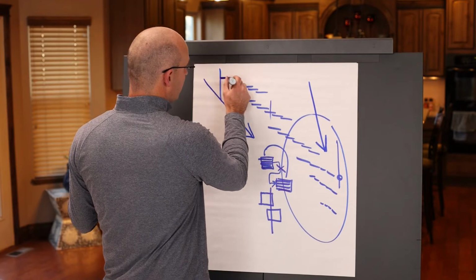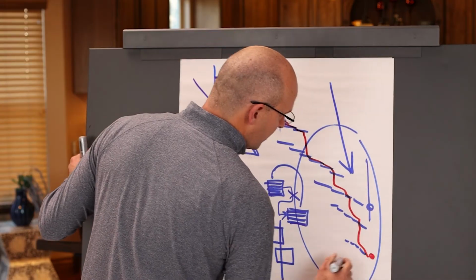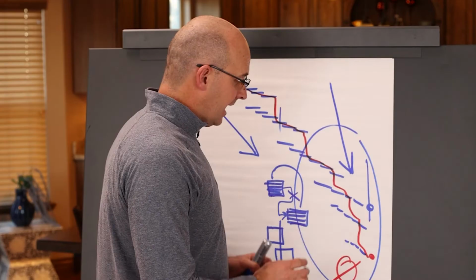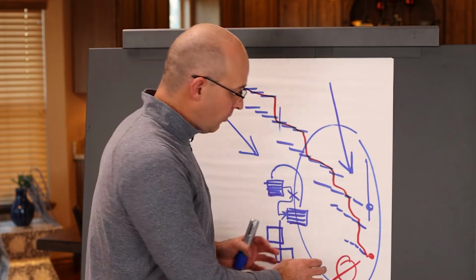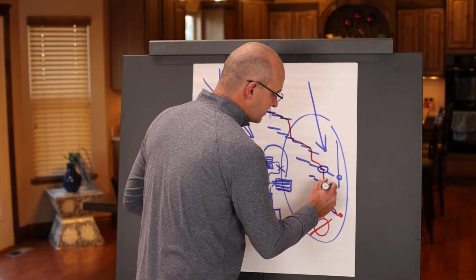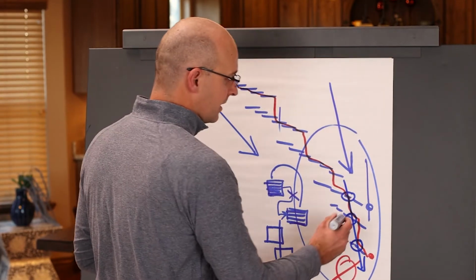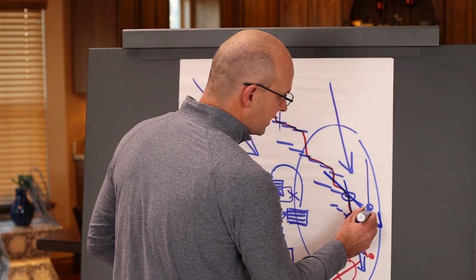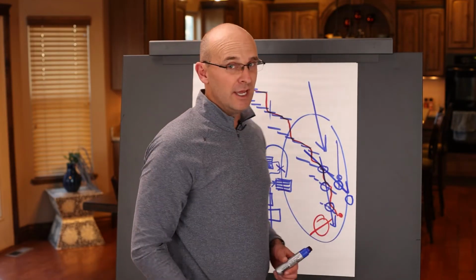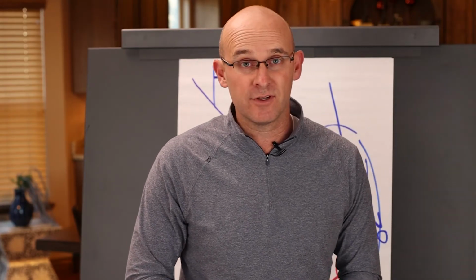So your critical path might come down through here, right, and say, okay, we're good, and we have 0 days of project float, total float. Okay, and you could think to yourself, oh wow, I'm on schedule, but because these activities are stacked, they're really not going to do this steep incline. They're really going to do this, and they really need that extra time. So your schedule could be 3, 4, 5, 6 months behind schedule, and you not even know it.